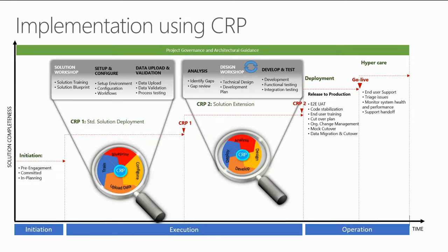I'm not going to go through this in a lot of detail, but basically, as I said, it's more about focusing in conference room pilots, engaging the client early, and focusing the first conference room pilot on a completely standard deployment, no customizations, validating where standard works and where it doesn't, and then moving into an iterative conference room pilot cycle after that for customizations as we go.